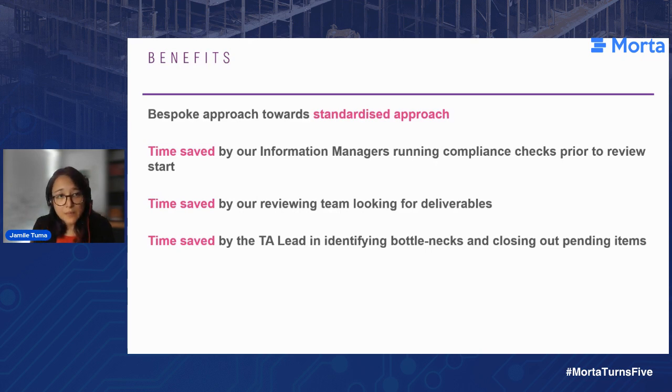It's time saved by our information managers running compliance checks prior to the review start. Once the documents start getting uploaded, it's quite easy for us to see that number growing, the submission compliance growing. So we are a lot faster in giving the go-ahead to the LTA for commencing the review, and not relying on that export, manual process, Excel, and then reporting back. So this is a lot faster. Also, the LTA has visibility over that submission compliance table, so they can even monitor how the percentage is growing.